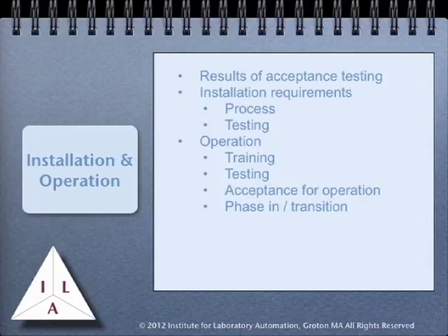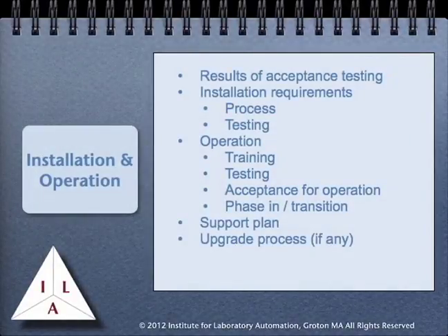People need time to make adjustments and manage the simple fact that people are going to be resistant to change, nervous about it, and make mistakes. Beyond those points, the support plan needs to be detailed, and any recommendations for how future upgrades can be performed need to be noted. This last point should address any special concerns about programming, product availability, how things were done, and who might have special knowledge that is critical to the system and its success. This information will be useful to whoever takes over the project next, and remember, it still might be you.